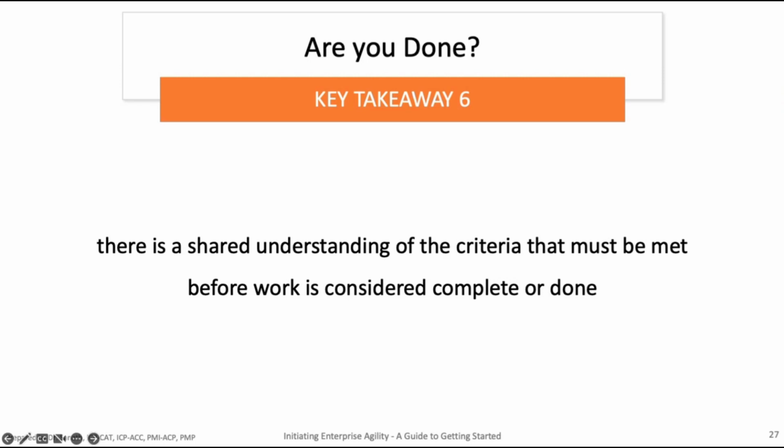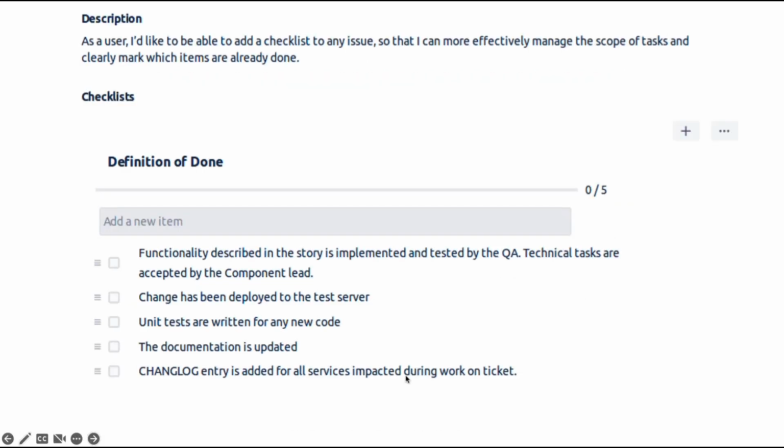But now let's say Raymond has this checklist. Okay, this is the definition of done. He's got all that cleared out. He knows that by finishing this particular requirement, it means he has finished all of that. I've updated my documentation, I've communicated to my stakeholder, I've done this and that.